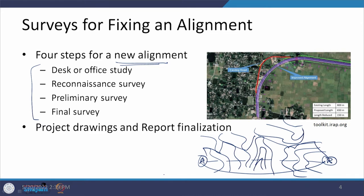Based on the ground information gathered, we may have fewer alternatives available, and more data is collected using various tools — resulting in the preliminary survey. Out of this preliminary survey, we finally arrive at one alignment to be used as the final alignment. Any data not collected in the previous three steps needs to be done, and the result is the project drawings and the detailed project report.